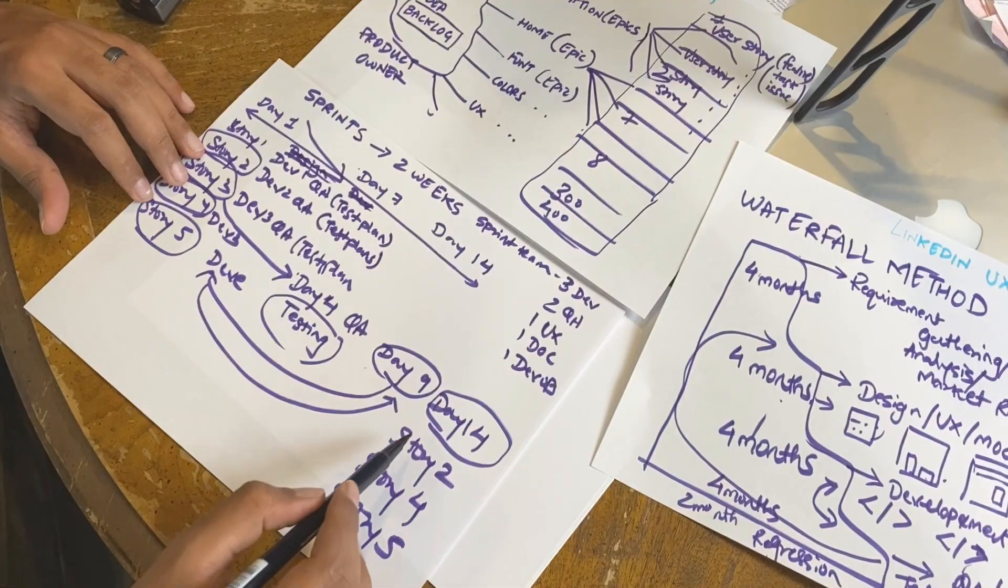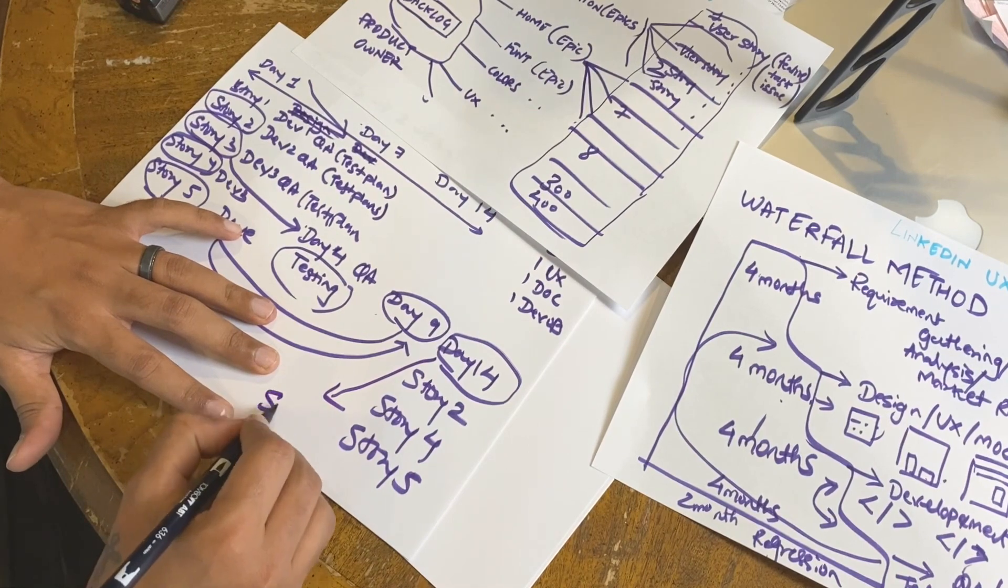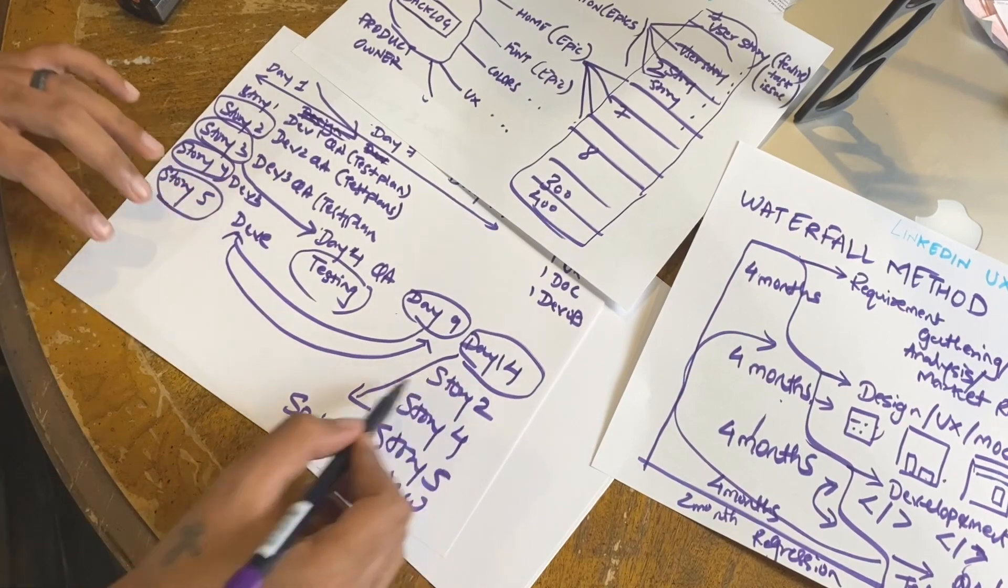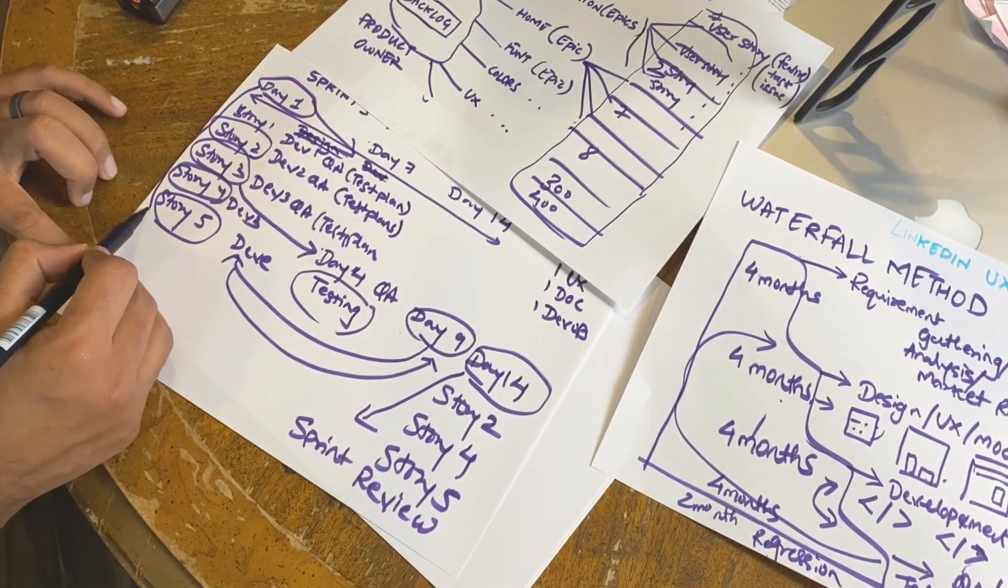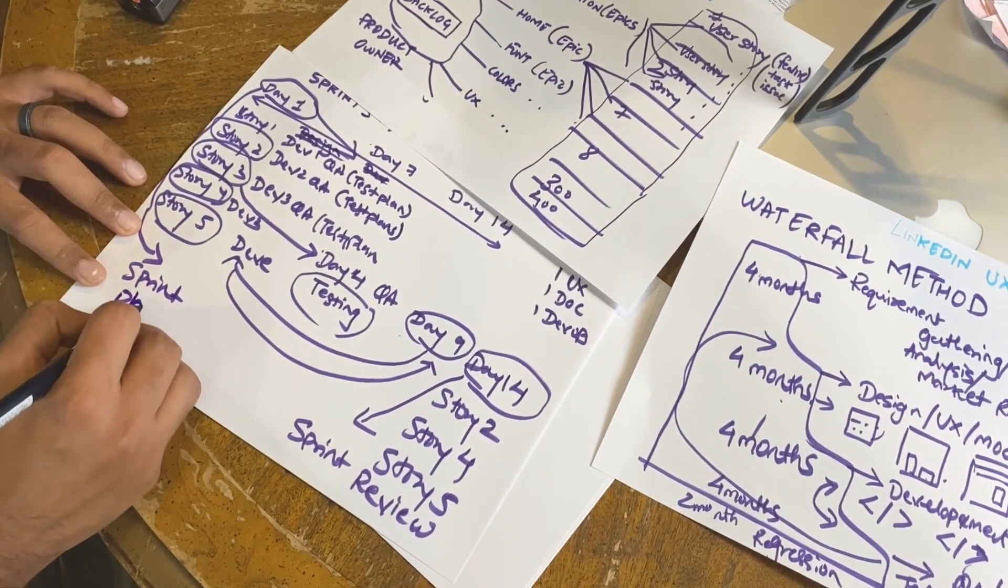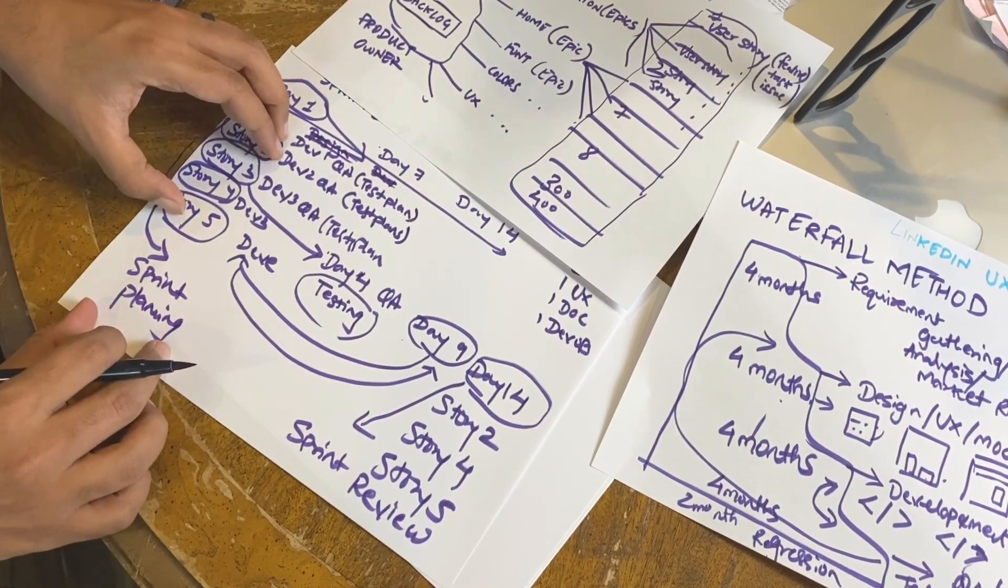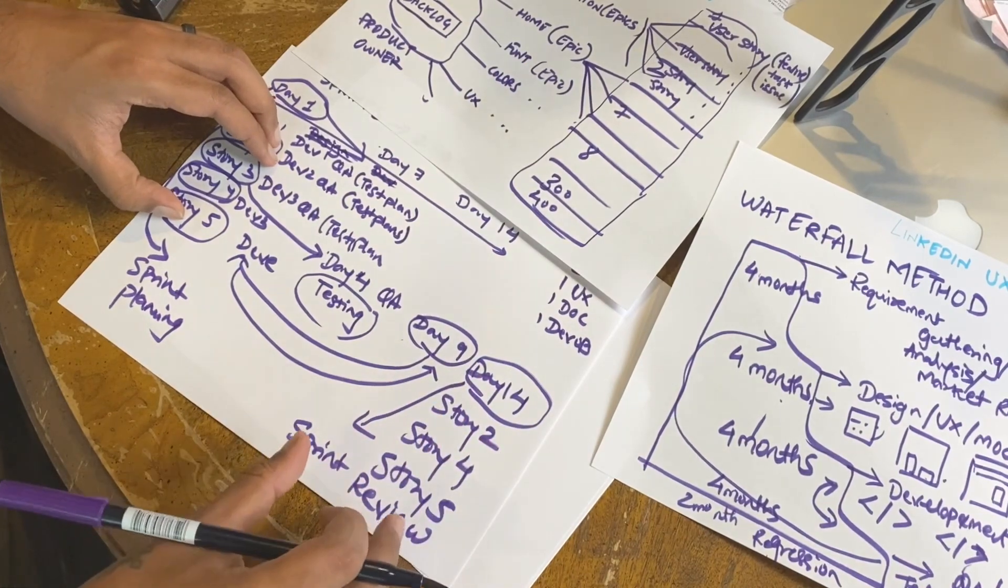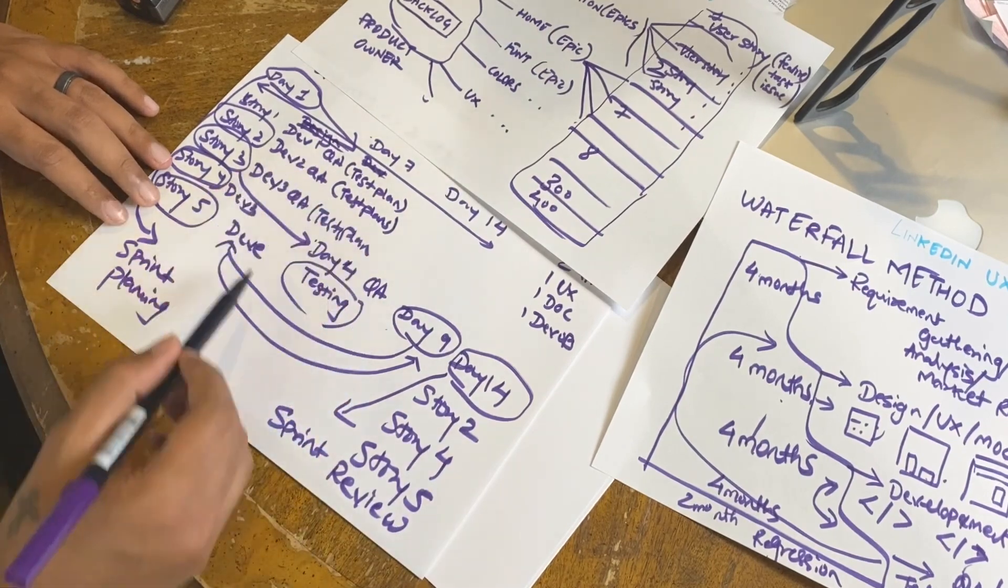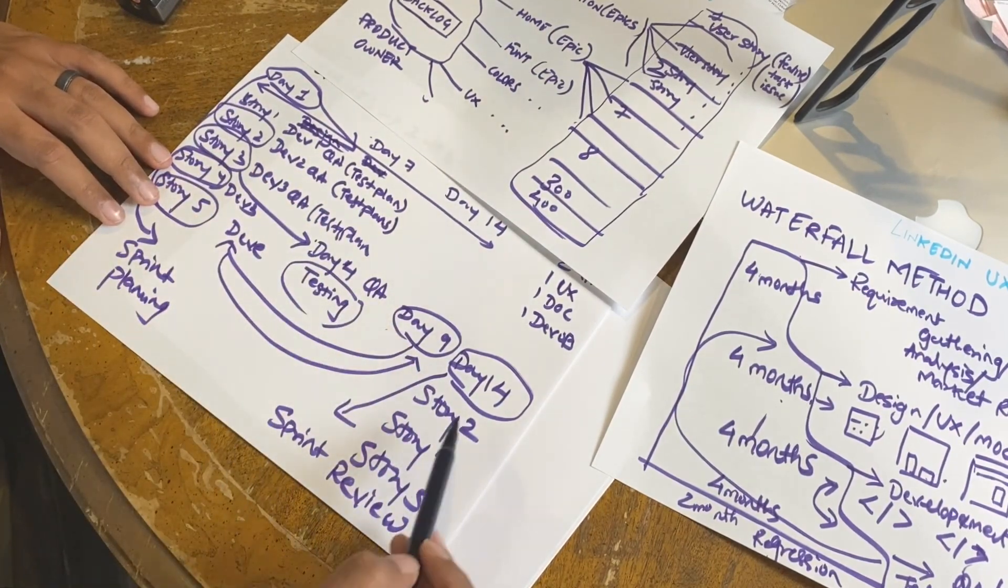Three stories happen. Now Scrum master basically schedules sprint review on day 14, or day one. On day one, sprint planning. On day one they decide what work needs to be done. On day 14 they review the work completed. The development team and QA team will demo that these are the functionalities we got done in 14 days.